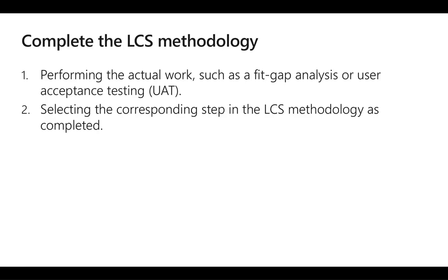To help ensure that the production environment is used for live operations, Microsoft will provision the production instance only when the implementation is approaching the operating phase, after the required activities in the lifecycle services methodology are complete.